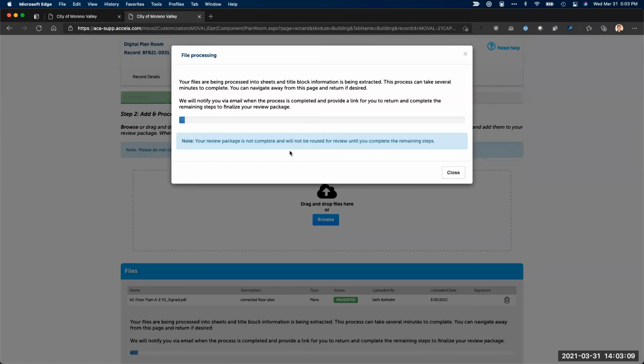So we're going to convert your plans and supporting documents from the PDF to the web-based format. And then again, we're going to take any plan files apart into the individual sheets, uniquely identify each sheet by sheet number, and then we're going to use that information to be able to version those sheets into your overall plan review project within the system. So it's incredibly important that you keep consistent sheet numbering from submission to submission so that the system can automatically link those sheets together and increment their versioning.